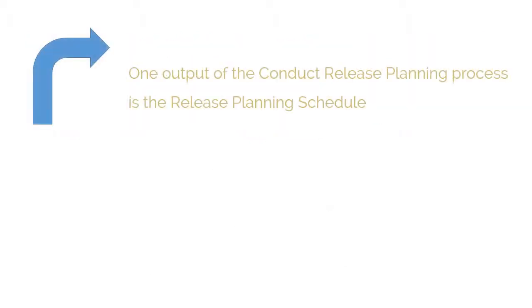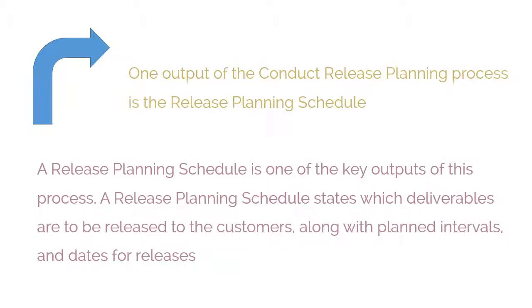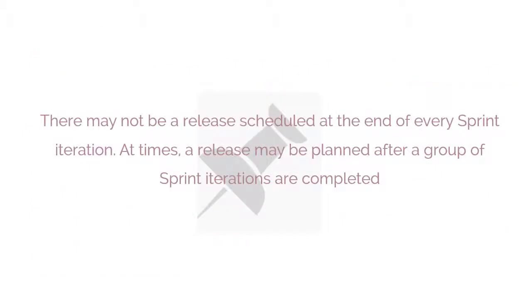One output of the Conduct Release Planning process is the Release Planning Schedule, which is one of the key outputs of this process. A Release Planning Schedule states which deliverables are to be released to the customers, along with planned intervals and dates for releases. There may not be a release scheduled at the end of every sprint iteration; at times, a release may be planned after a group of sprint iterations are completed.